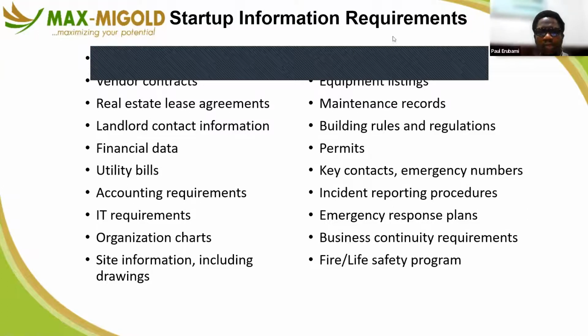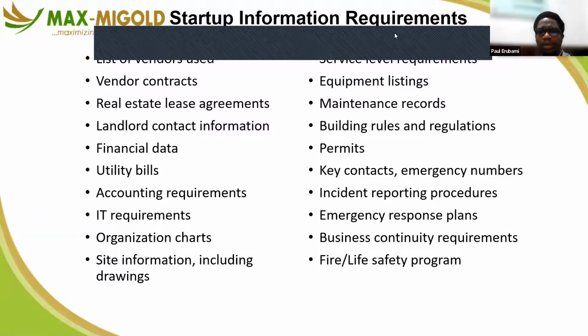But, and this is very important, facility managers, you cannot outsource your problem without trying to understand it. Let me put it that way. Every time I hear, oh, they're asking me to come and do a proposal to manage facility management for them, I ask, what kind of documentation do they have in place? For example, they don't have any documentation that describes what services they need, what people want to do in those facilities, what particular considerations and constraints I need to have, historical costs, the asset register or equipment list.